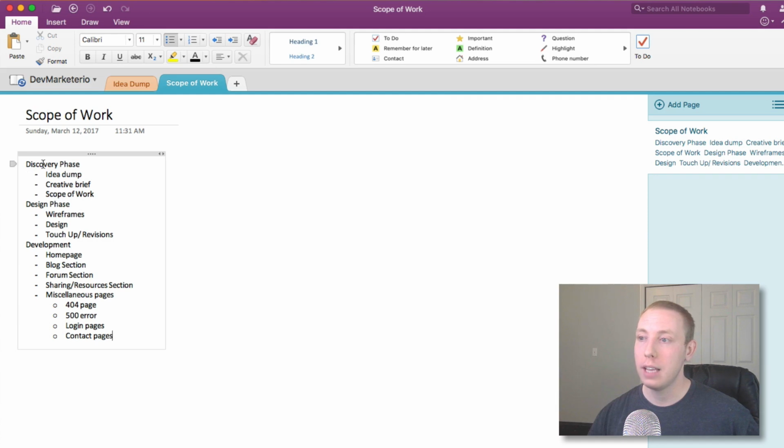So I would generally say, let's say it's February 1st. Well, if it's February 1st when we start this, we're going to finish the discovery phase by February 28th. Then the design phase will start March 1st. And then the development phase would start, and I put deadlines like that. And then in here, if this starts April 1st, the homepage is going to take a week. So April 7th, this project will be done.